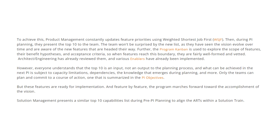Product management constantly updates future priorities using the Weighted Shortest Job First methodology. Then during PI planning, they present the top 10 things to the team. The team won't be surprised by the new list as they have seen the vision evolve over time and are aware of new features coming their way. The program kanban is used to explore the scope of features, their benefit hypothesis, and acceptance criteria. When features reach this boundary, they are fairly well informed and vetted — architecture and engineering would have already reviewed them and various enablers have already been implemented.